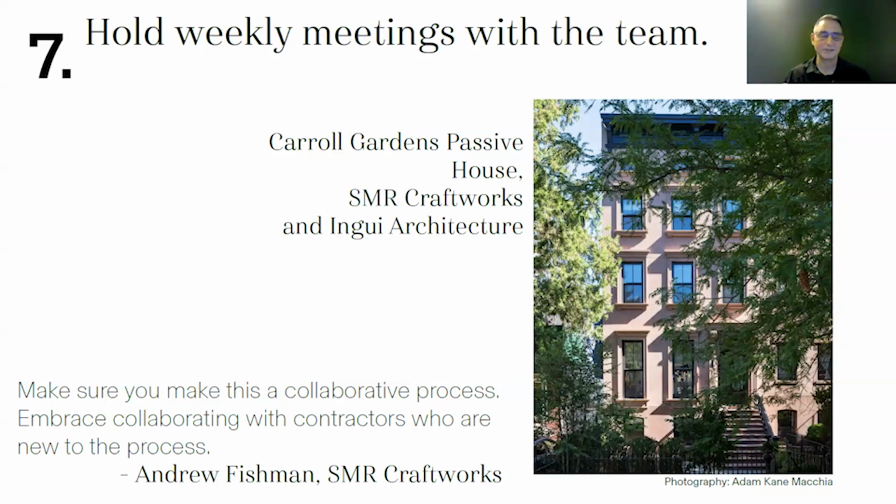If you don't, someone's not going to know what's going on. Someone's going to be confused about something. Some detail's going to get lost. And very often projects are delayed because people are not getting the contractors what they need in time. And it doesn't feel very collaborative.